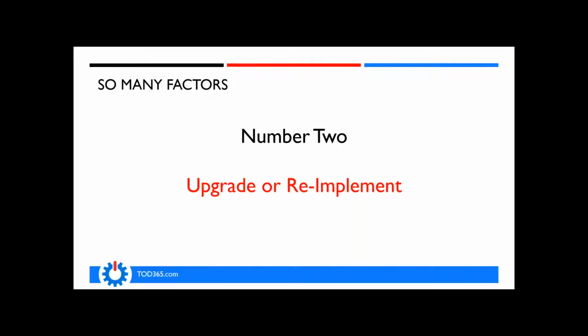The upgrade or a reimplementation of a new ERP implementation, that's always an opportunity to clean stuff out, right? Why drag the same bad data that you have up to your new system? Why not use this as the opportunity to clean that? And besides the cleaning, you may also be in a situation where you've heavily modified your system and you've got a bunch of data out there and a bunch of transactions based on business functionality that you've created that now in the new system has no place to go. So, what do you do with that, right?